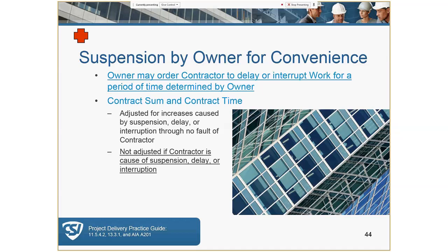If the contractor is delayed in this scenario, then the contractor would be entitled to an extension of time and may be entitled to remobilization or acceleration costs when the work is resumed, plus the cost of any adjustment for the added work. So if the owner decides to suspend the work, you just need to be aware that there could be added costs that are more than just the time.